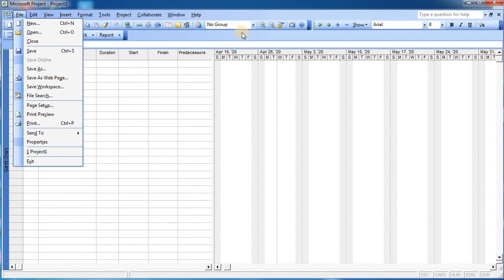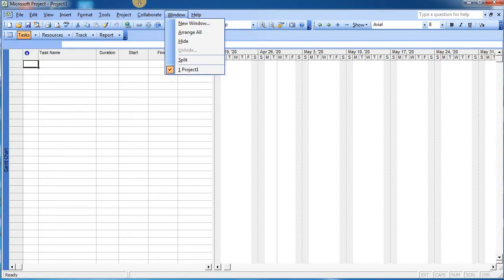So to start up with the project, we will go in sequence, and the first part is to write down the starting date of the project. Now again it is a part of discussion. If you don't know when you want to start your project, then you need to write down when you want to complete your project. So either of the two, that means the starting date of the project or the completion date of the project, you should be aware of.